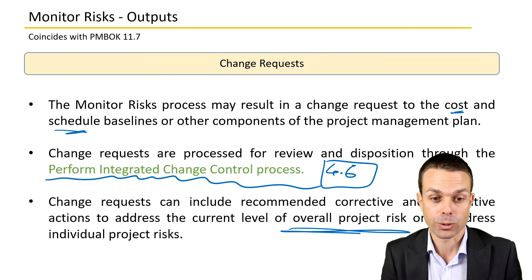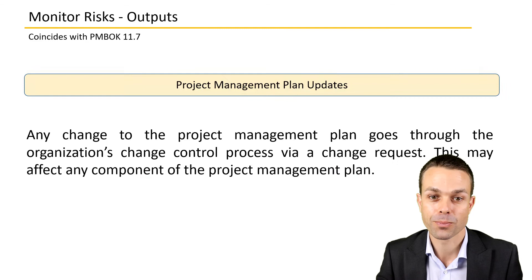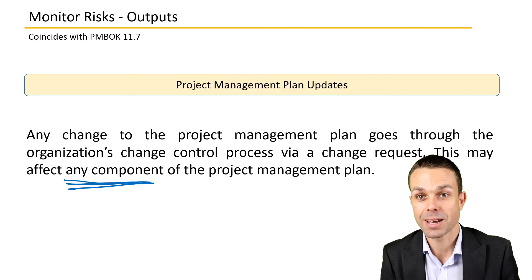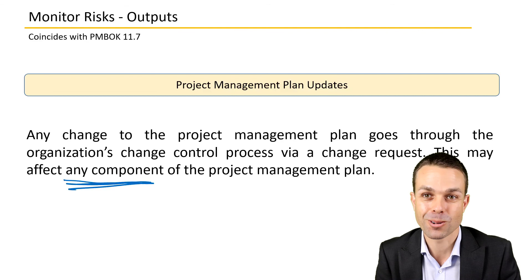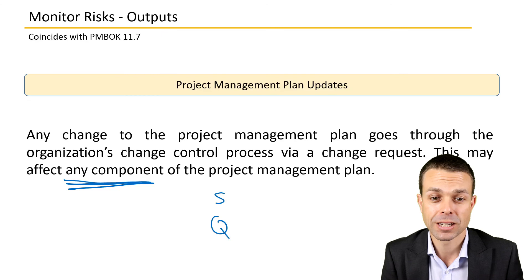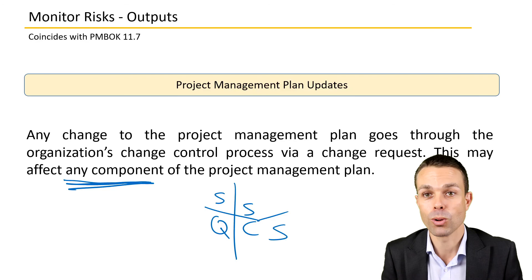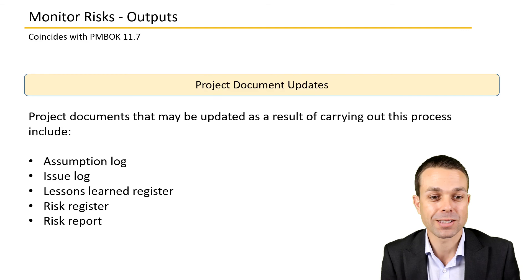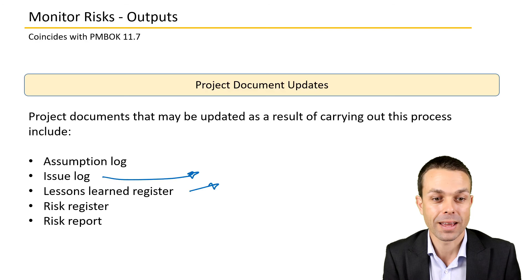Any change will affect our schedule, cost, or scope. Project management plan updates — any component of the project management plan could be updated. It's also a baseline document and will need to go through the change request process. Scope, quality, schedule, cost — all of these things might change, and stakeholders might change as well. Project document updates we'll see are our issue log if we have any issues to raise, lessons learned, the risk register if we're adjusting or adding any risks, and our risk report so that we can send the most up-to-date information on our risks out to our project stakeholders.